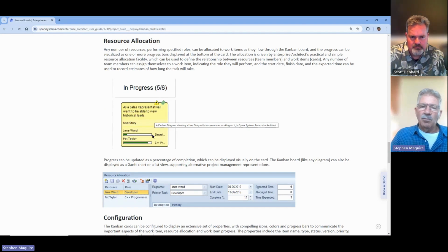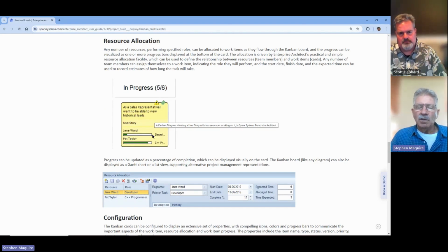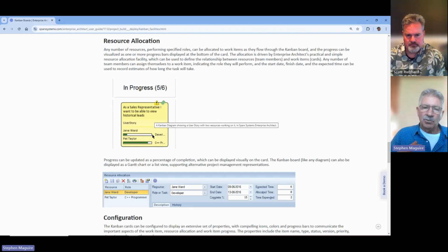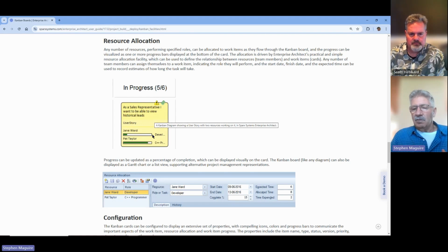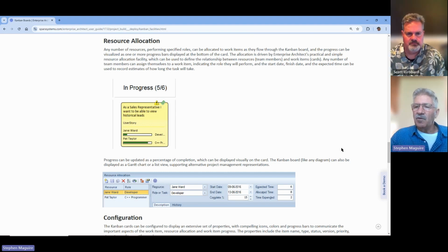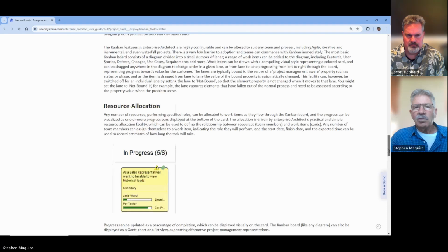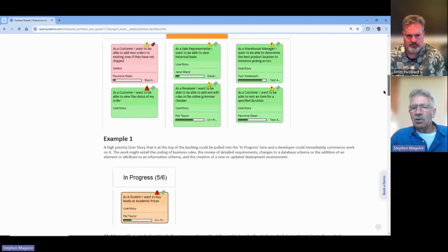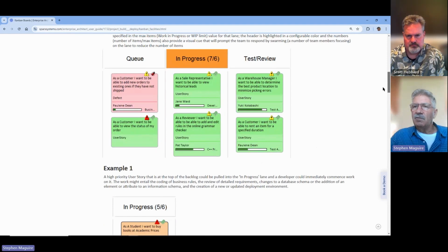Now, this is a very important technique in Agile, where if something is really important and a critical feature, critical function, defect, critical story, people can swarm in on this story or the defect, whatever it is, and start working on it. So this isn't an old world way of doing things. The developers, the analysts, the people themselves have access to assign themselves to the particular element, and indicate what percentage of work they have completed. So you can see what progress is being made.